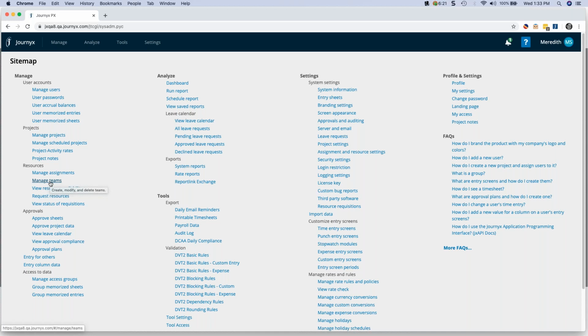But you don't necessarily know who will do that work, let's say 6 months out, and you don't necessarily want to identify a specific individual or make individual assignments and then 6 months later say, oh, that person's no longer here, that person's no longer in this department. So you want to have something that's more general, and so that's the idea of the team assignment.